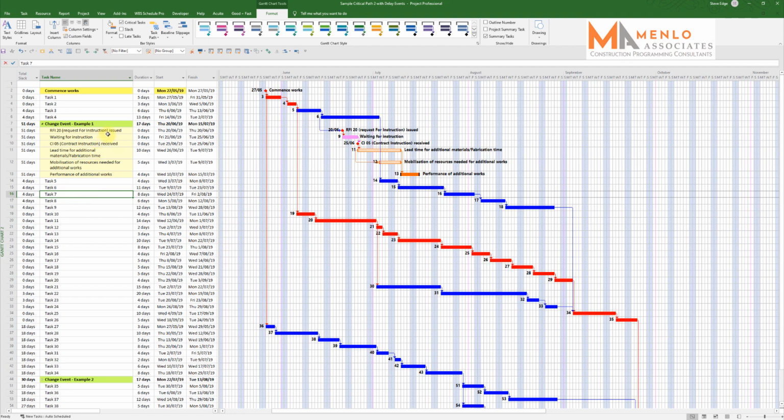Now, whenever an event happens, something unforeseen, or there's a change, you hit a problem. So in this case, if we're assuming that this is excavation across site, basically 5 days in, you find the soft spot. So you immediately flag it and you ask a question of the engineer.